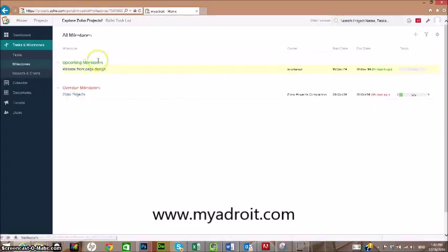All right, awesome. Now we have our upcoming milestone, and you can see right here that I had an overdue milestone highlighted in red. You'll see here that it's 46 days ago, only 2 tasks have been done, which leads to 12% of overall tasks done related to this specific milestone. This progress bar gives you a very quick overview of where you are exactly, and this is something you can share with your client.